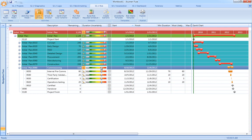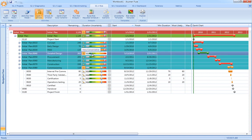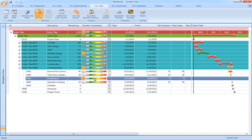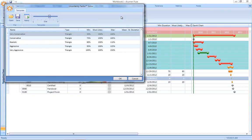We can flag exceptions either on a per-group or per-WBS basis, but also flag exceptions on individual activities as well. Behind the scenes, there is what we call an uncertainty factor template that allows us to define exactly what those buckets of uncertainty actually represent.